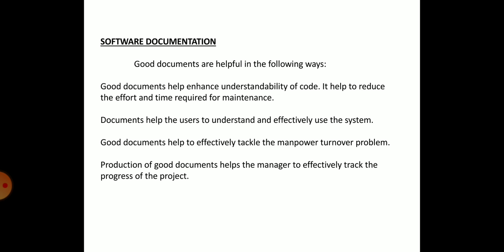And production of good documents helps the manager to effectively track the progress of the project. As the software development process does not have a physical appearance, it is important to track the progress of the project using the documentation of the project. The project manager would know that some measurable progress has been achieved if the result of some piece of work has been documented. And by reviewing these documents, he can measure the progress of the project.